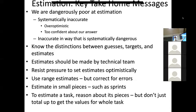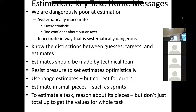If we had a suitable level of humility, we'd be getting eight, nine, or ten of these right — choosing bounds that are reflective of sufficient uncertainty. Instead, we tend to give narrow estimates, thinking we're more capable of judging how long things will take than we actually are. This is systematically dangerous in the sense that it puts our project at risk of being judged as a failure.